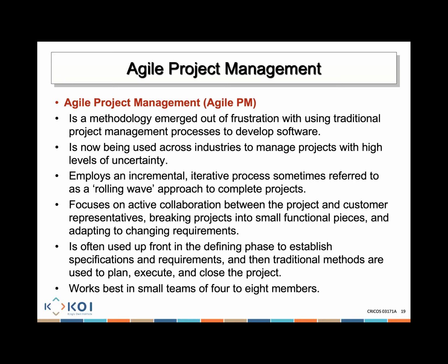But the difference between that and traditional project management is in Agile, every component that we deliver, I could deliver component 1 in 4 weeks, I could give that directly to the customer and they can start to use it immediately. That's different to traditional project management, where if there are 20 components, I can only give them the outcome once I deliver all 20 components.